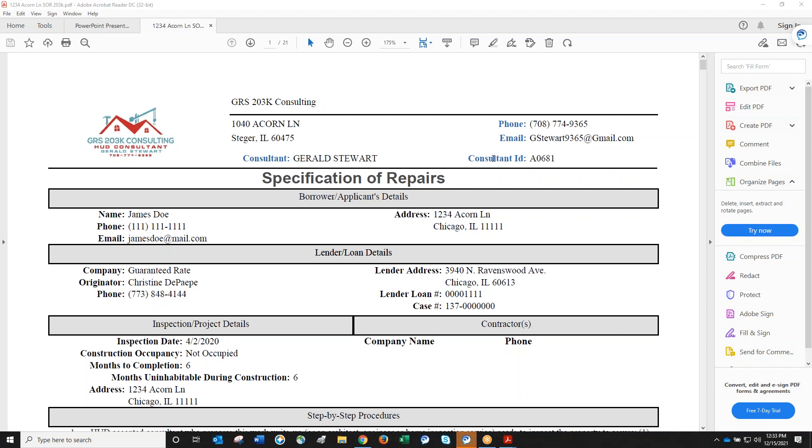How do change orders work during construction with the contingency reserve? Contingency reserves are set aside for unforeseen conditions once the loan closes. The GC performs demolition and may discover termite damage, rotted subfloor, missing studs, or no insulation. These conditions must be addressed for safety and health and are considered viable change orders.